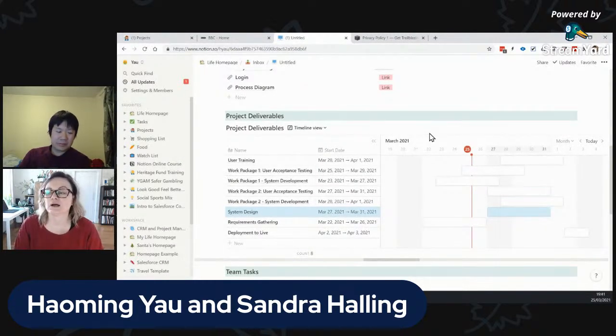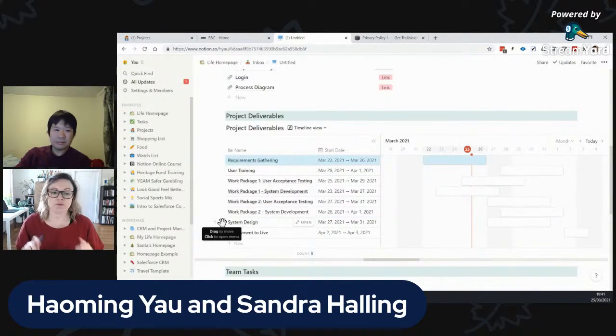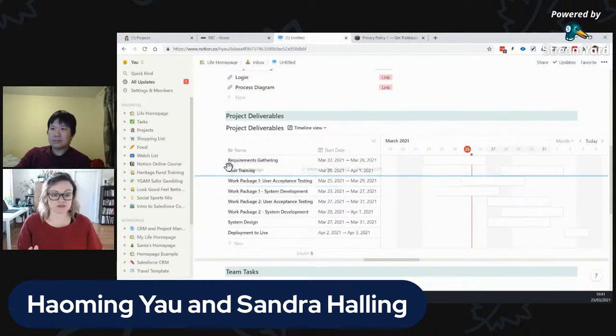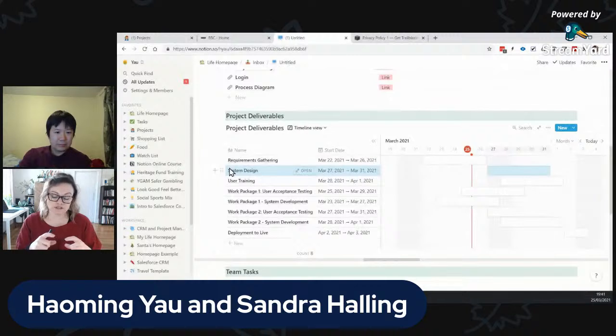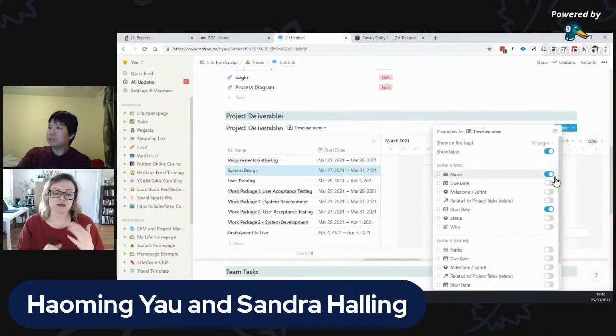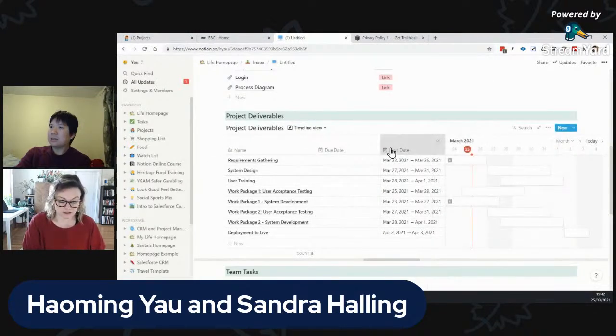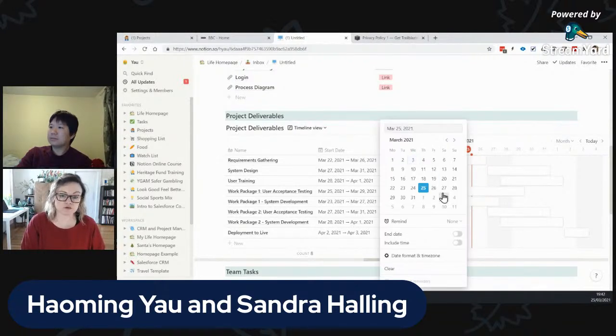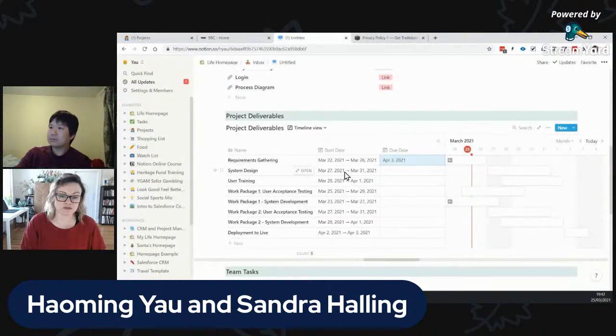The other thing I was playing around with a client the other day, as we were looking at how you format your roll-ups that are dates, impacts how it displays on timeline and calendar differently. The way the Notion date field works, if you do a date range in one property, that is not the same as having two different fields that are start and end. So while it might feel a little redundant, in some cases it's better to have more fields that spread that out. One roll-up format does better if you use the latest date on the calendar, and then the date range works better on timeline because you can see the full span.